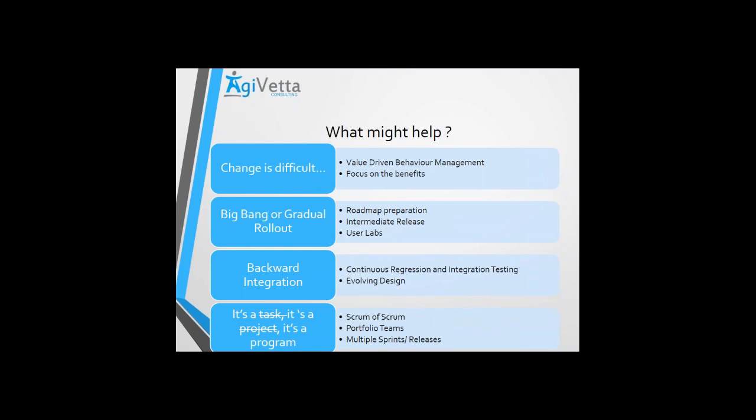And that's where the concept of velocity also changes, because typically what we have been trying to do in Scrum is maximize velocity. Maximum velocity is not the goal here. The quality of the features that you're delivering, the completeness of the features you're delivering is the goal. So even if you deliver one item but that is complete, that is something that you need to focus upon. Velocity will pick up once you have a lot of insights and so on and so forth. So more than velocity, the predictability, acceleration and the quality of output is what is more important. So use Kanban at a release level, work on the PPF concepts, and then you will take it forward.